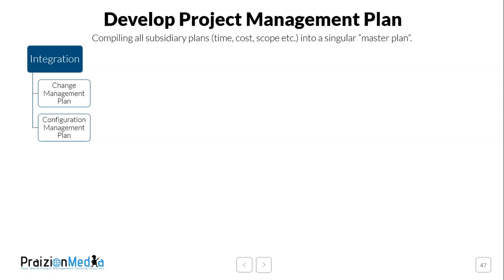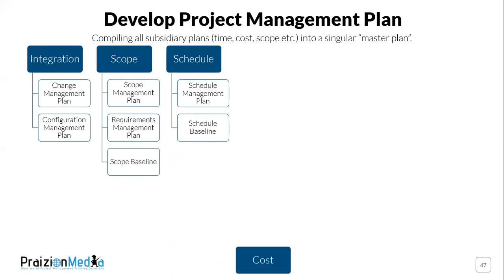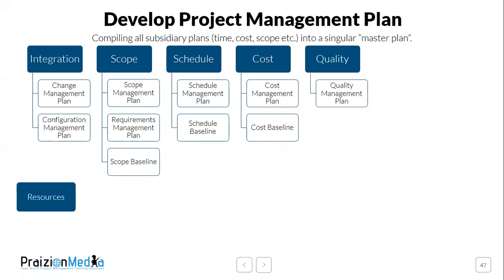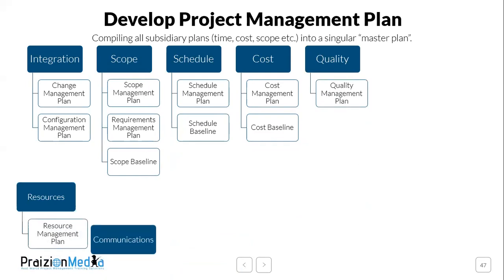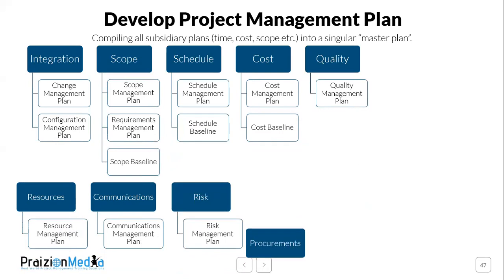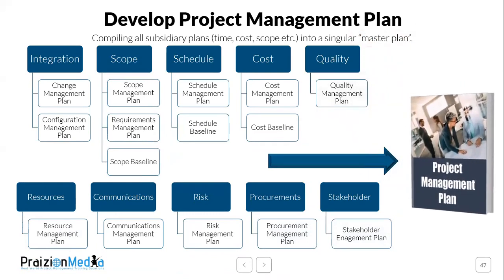We then have scope management, schedule management, and cost management — each with their own baseline: scope baseline, schedule baseline, and cost baseline. Each area also has plans: quality plans, resource management plans, communication management plans, risk management plans, procurement management plans, and stakeholder engagement plans. The confluence of all of these is the project management plan — the major output of the process.